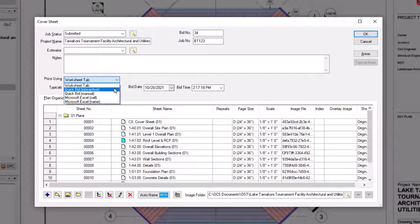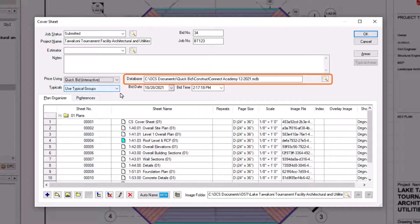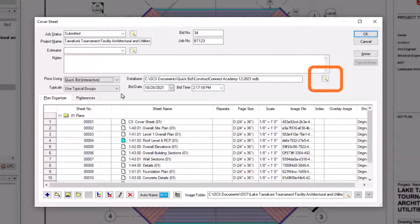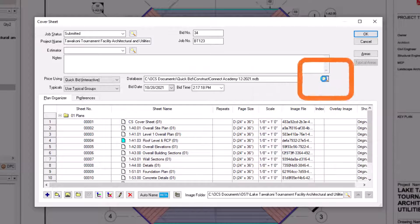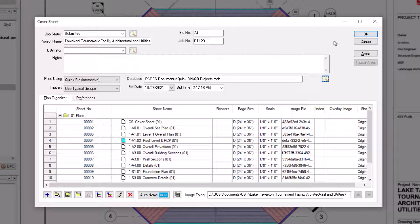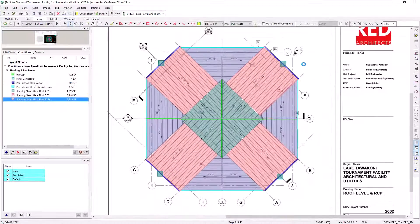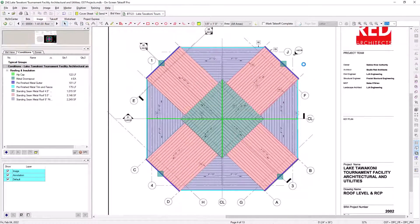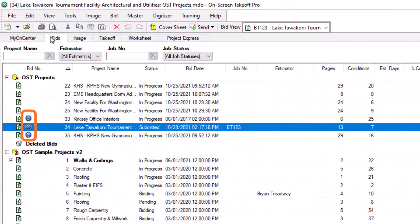Let's select QuickBid Interactive for this example. Once you make your selection, a database field then displays to the right. This allows you to choose the QuickBid database in which you want this job to appear. Click on the magnifying glass, and then select the desired QuickBid database. Then press OK in the cover sheet, and the job information is transferred to QuickBid, and you can begin pricing your bid there. Both bids share the same name, and an icon appears next to the bid name in each program, indicating that the bid is linked between OST and QuickBid.